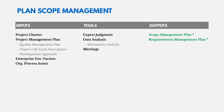In almost all processes that start with 'plan something' — plan scope management, plan schedule management — the project management plan is the input, and the individual plans like the scope management plan or requirements management plan are the output. The project charter and project management plan come in as inputs, along with enterprise environmental factors and organizational process assets, which are very common inputs. Tools include expert judgment and alternatives analysis for thinking about different ways of getting the work done, as well as meetings.